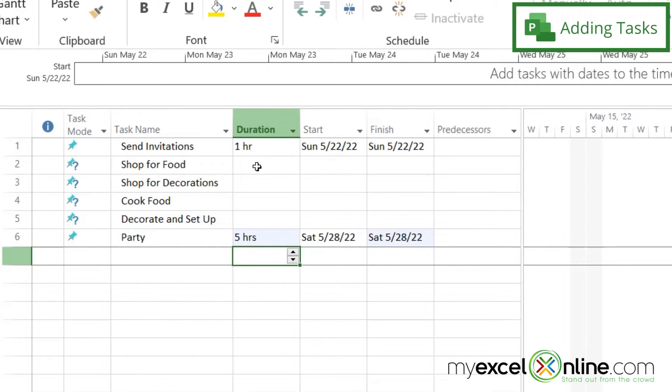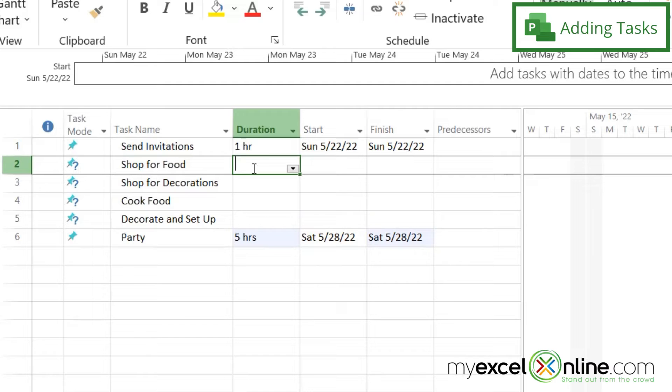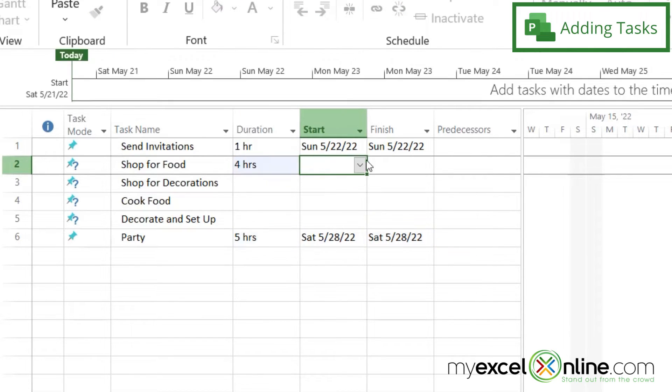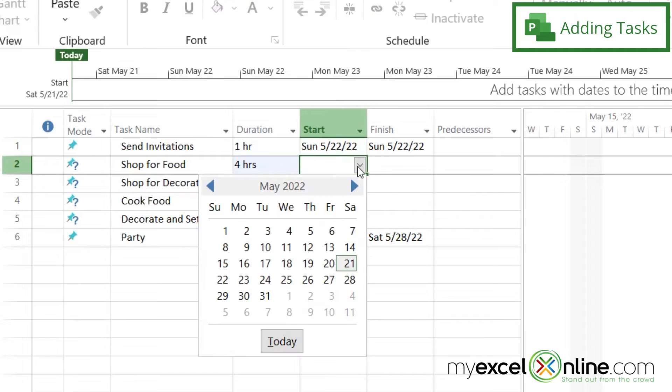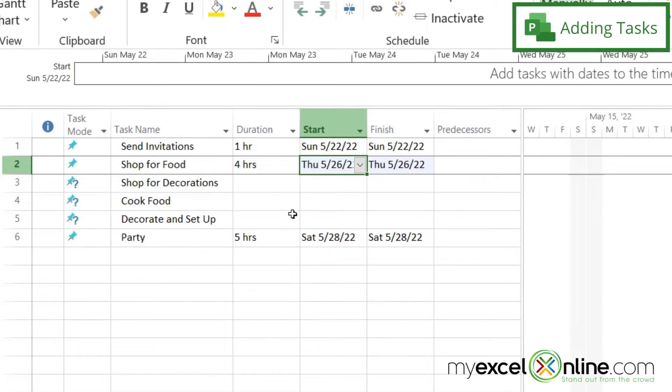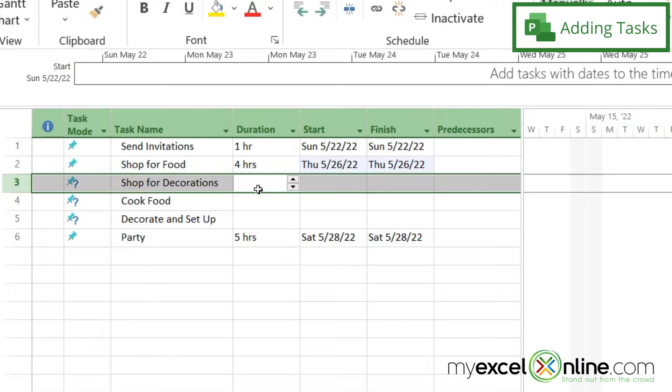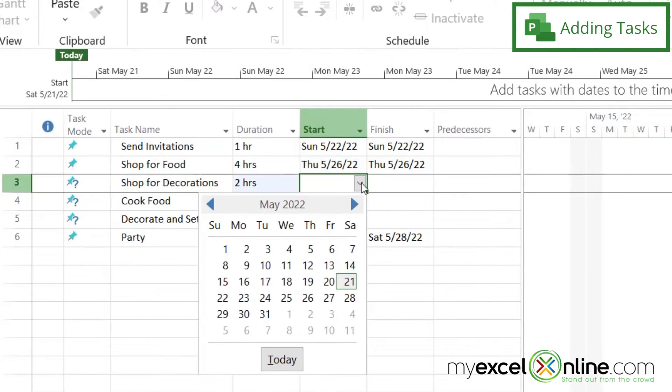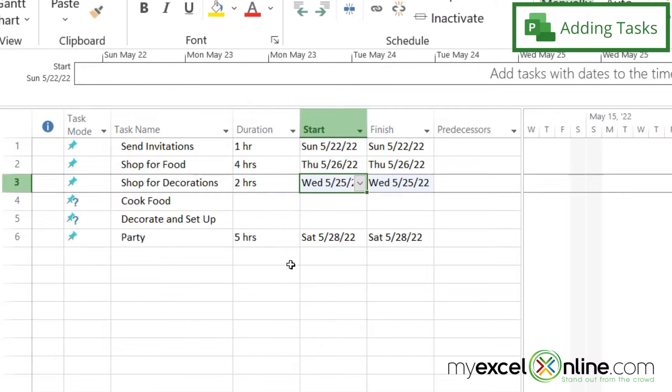So let's say shopping for food is going to take me about four hours. And let's say I want to do that two days before the party happens. And let's say I'd like to shop for decorations, and that's going to take about two hours. And I could do that on the Wednesday before the party.